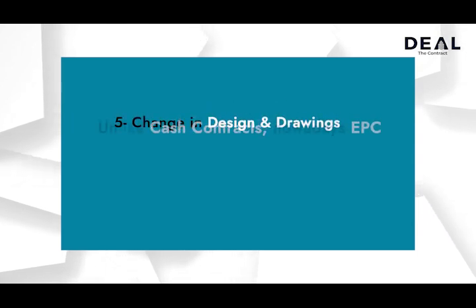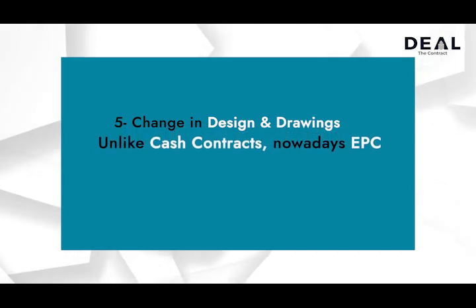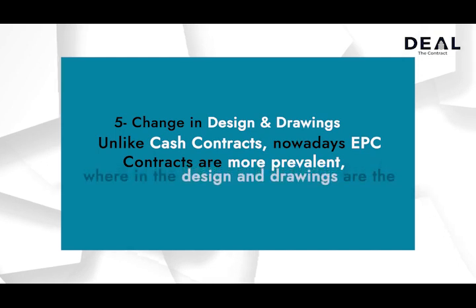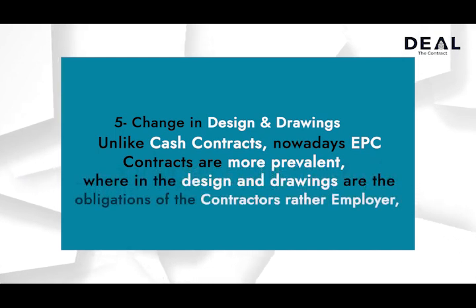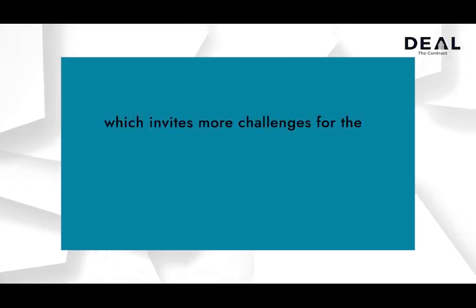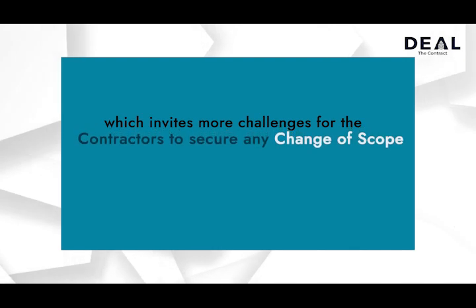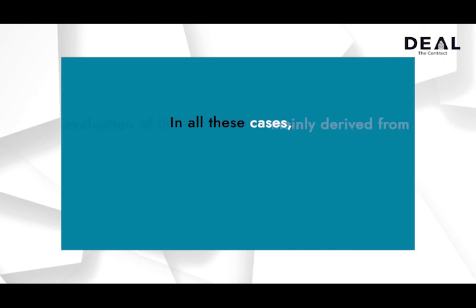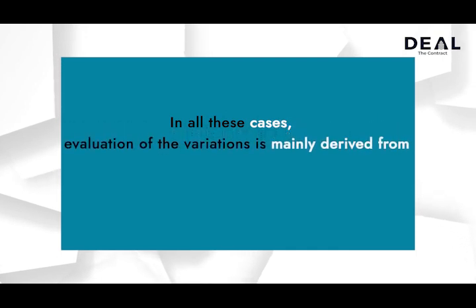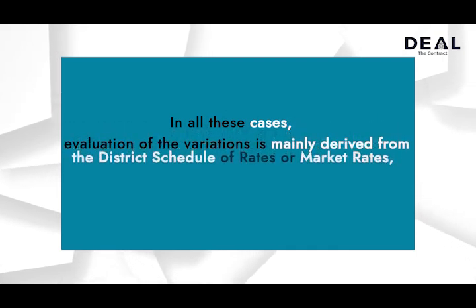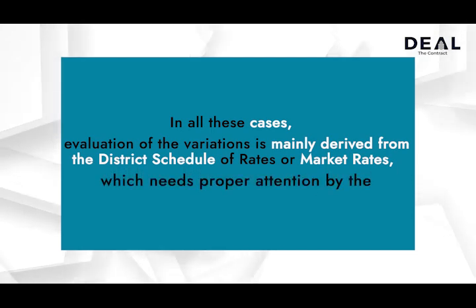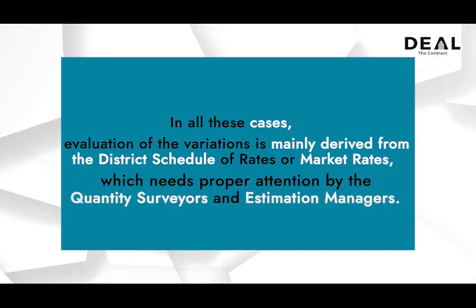5. Change in design and drawings. Unlike cash contracts, nowadays EPC contracts are more prevalent wherein the design and drawings are the obligations of the contractors rather than the employer, which invites more challenges for the contractors to secure any change of scope from the government authority. In all these cases, evaluation of the variations is mainly derived from the district schedule of rates or market rates, which needs proper attention by the quantity surveyors and estimation managers.